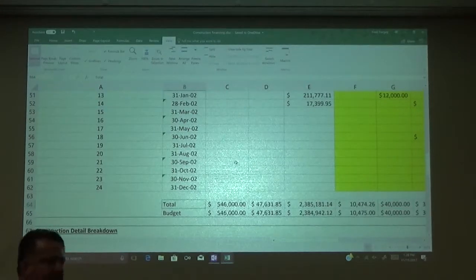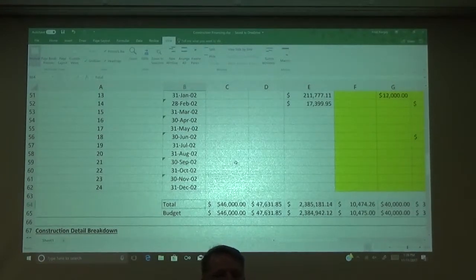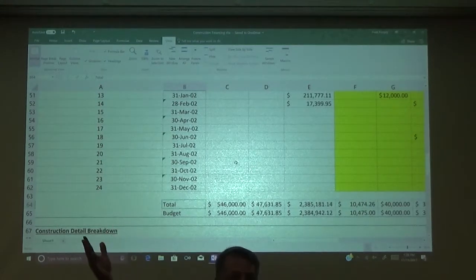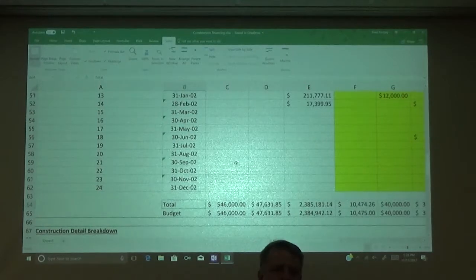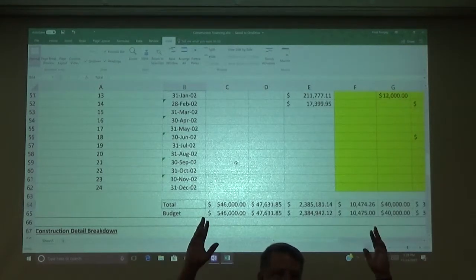It really depends on the kind of project. For example, if you're doing a renovation project on an old historic building, you're probably going to put in a pretty massive contingency because you just don't know what may be behind the walls or underneath it as you start to renovate. There, you might put in something as high as a 30% contingency. But whenever you're talking about something extremely mundane, like this particular property, which is self-storage, there's probably not a whole lot that's going to go wrong. In most cases you're talking about either concrete masonry unit walls or tilt wall construction, and it's about as basic as you can get.